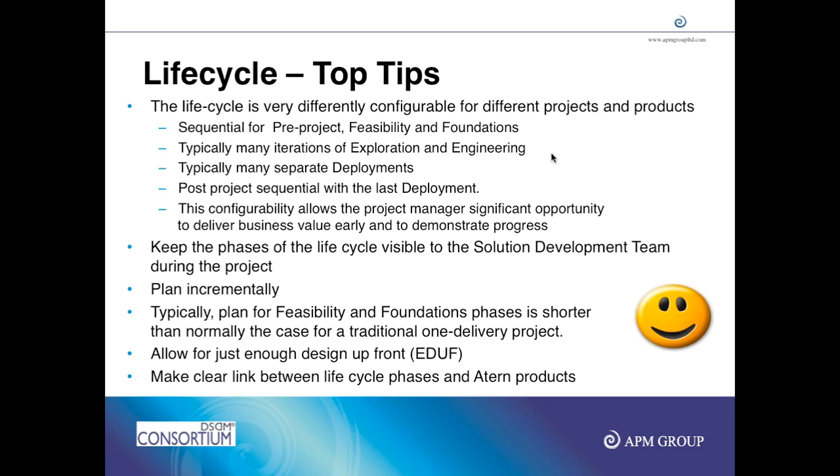The life cycle of a turn includes 7 phases. The sequential phases are pre-project, feasibility, and foundations, whereas exploration and engineering are combined to provide an iterative development method. Deployments could be separate. Post-project is sequential with the last deployment. So after all releases, you might want to go and see what we have achieved.